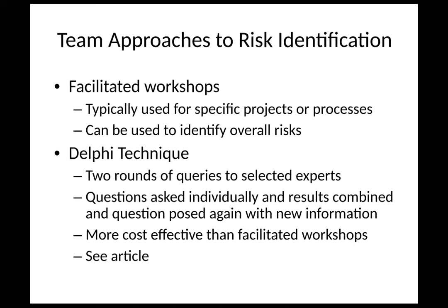The Delphi technique basically entails 2 rounds of queries to selected experts. And you're going to be asking specific questions. You can say, what's the biggest risk to the organization? You're going to ask those questions individually and get the information, then combine what everyone said, and then send the results back out and pose some of the same questions again with the new information to see if that changes their viewpoints.